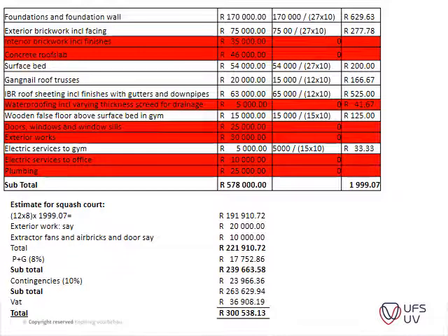Okay, so what happened here is you take out the items which are applicable to the project. You look at what the rate per square meter is, and the exterior brick walls you use, you can see that's the same. You didn't have interior brick walls, so you could leave that out. Same with your concrete slabs, you didn't use that. Your waterproofing was also not included. And then what you do is you take all of these items, the rand per square meter, and you estimate what your new rate per square meter would be. You times it with your new building's area.